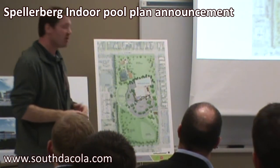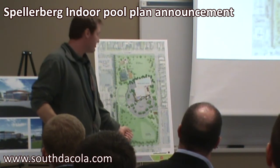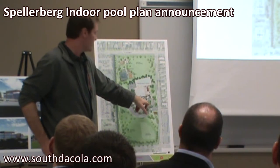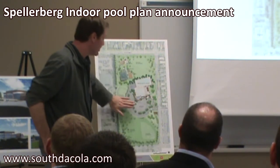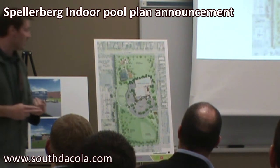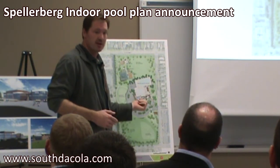Traffic for the project: most all the traffic you're going to see on the project is going to be on Western Avenue. We don't have any reason to be on 26 and be accessing from the south. I'll talk a little later about what 22nd will look like. But most of our access will be using the permanent access that we will be designing for the parking lot. Along with grading this, we're going to grade that parking lot right away. That gives us an area to lay down materials, to bring materials in, to unload materials, to really feed the project so that we do not disturb traffic. There'll be some extra trucks coming in and out, but nothing's getting stopped on the street. Everything's coming into the project.